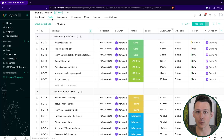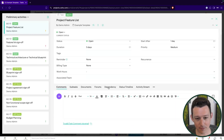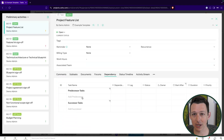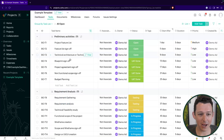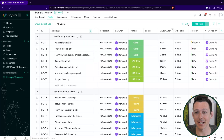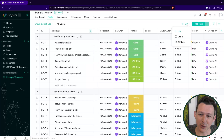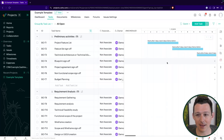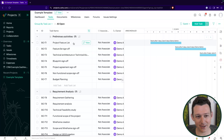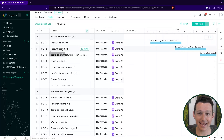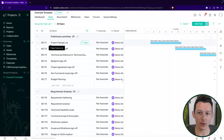Once I've organized things into those three objects, the next thing I want to do is look at dependencies and the Gantt chart. There are a few ways to do it — I can open an individual task and come down to the dependency section to add predecessors and successors. But that's not how I like to do this. Going one by one is really hard to keep track of mentally. I prefer to go into the task list, go to the Gantt chart, and build my dependencies there. I hold pretty strongly that this is the right way to do this.